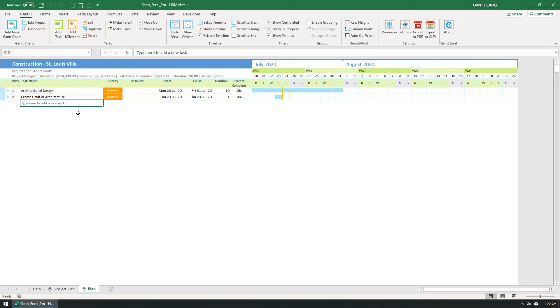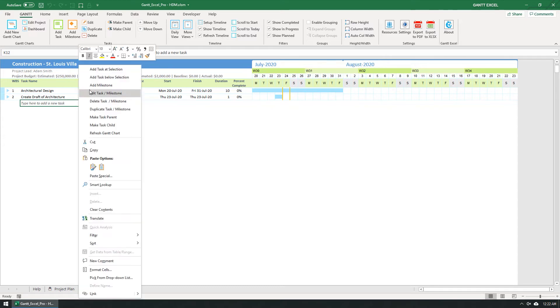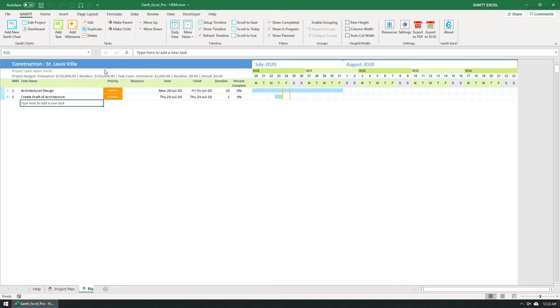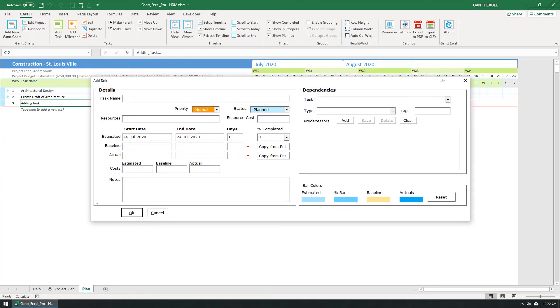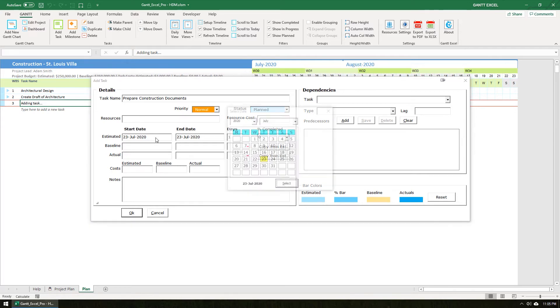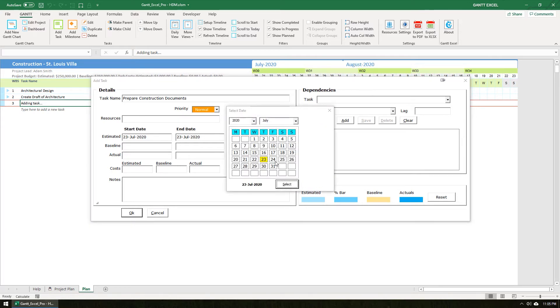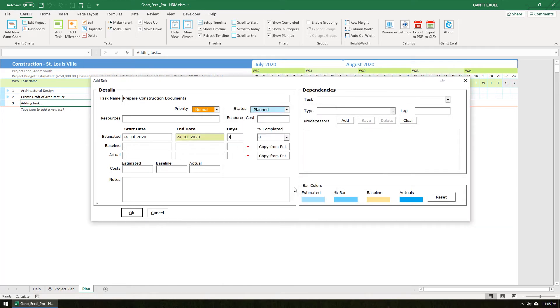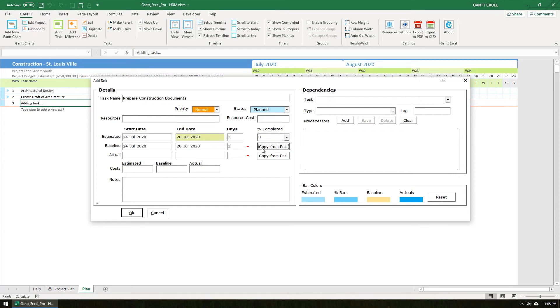The second method to add a task is to right-click and select the Add Task option from the context menu. Type in the task name and also, let's add a few task details. Let's set the estimated start date to Tomorrow. The date picker automatically shows up. Select the date and click the Select button. I'm going to change the duration to 3 days and the estimated end date is calculated automatically. I'm also going to click the Copy from Estimated button to copy the same dates into the baseline dates as well. Let's set the estimated cost to 2,000 US dollars.